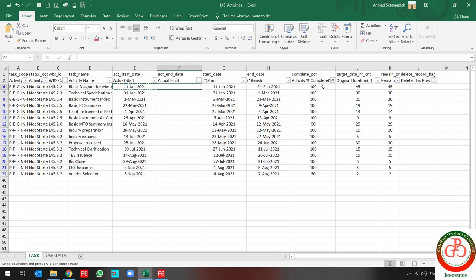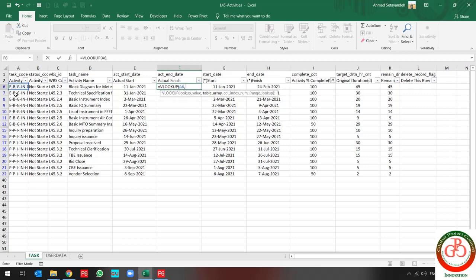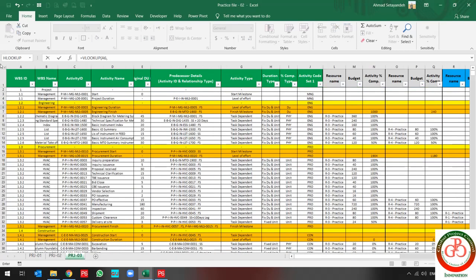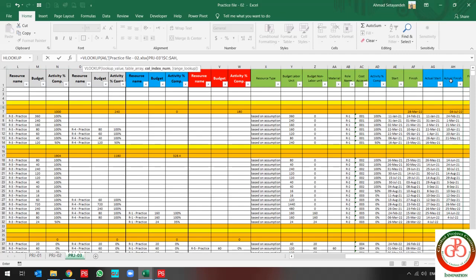In this session you need to update the actual finish too. I use VLOOKUP for actual finish in order to move data from this sheet to my destination sheet. And this is my actual finish.